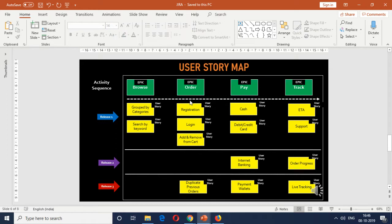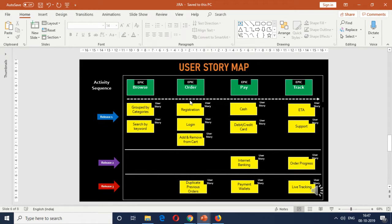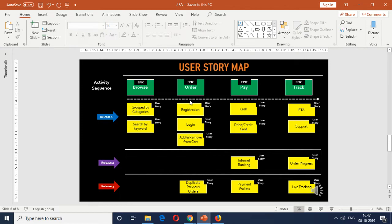And then there was also a section which talked about prioritization. And if you see the arrows release one and two and three, the user stories are grouped accordingly based on the business value. Release one is the MVP or the minimum viable product. So this is the minimum features which we can go live or roll out to public this particular product. So these are the stories which are grouped as release one or the MVP. So let's see how we can arrange this accordingly in the Jira tool.